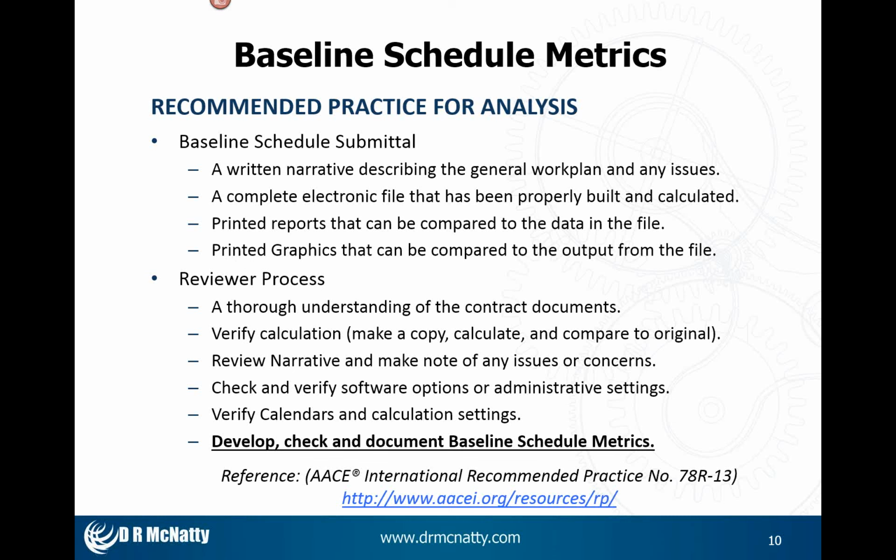The reviewer process, if I'm the reviewer, the first thing I need to do is make sure I've got a good understanding of the contract documents and what's going to be required. When I receive an electronic file, I make a copy of it and calculate it. I never calculate the original file that I received. That's, to me, destroying evidence. So I make a copy, calculate it, compare it to the original, including the submitted reports and graphics.